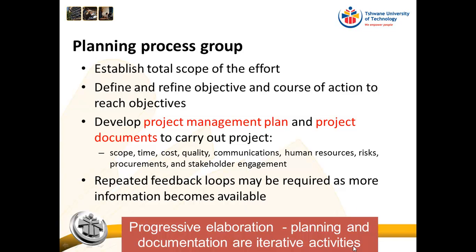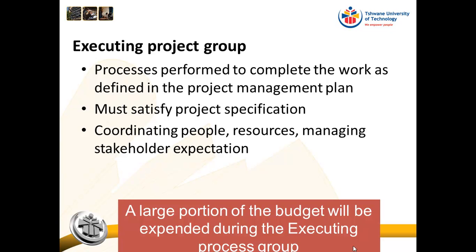So as more information becomes available, we update the planning. And this is also when we talk about the products and the project life cycle, you will see that that is why we use the life cycle approach where we do the project in phases, so that we don't plan the entire project from A to Z at the start when we don't have all the information available as yet.